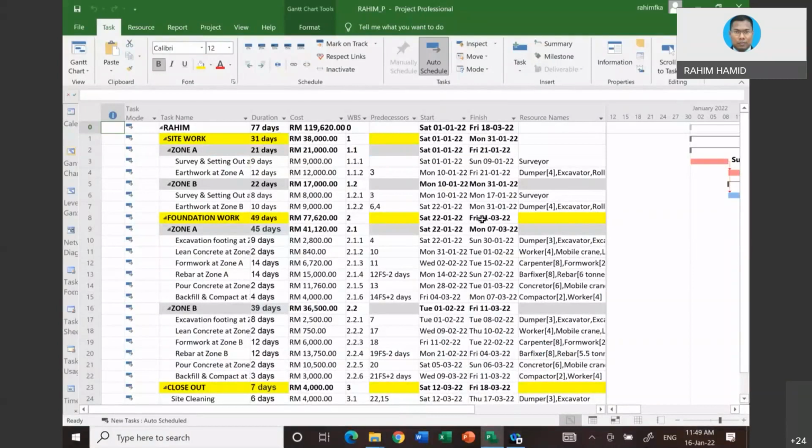Even when you already win a tender, for instance, within a few weeks, you need to submit real work program plus the S-curve. So now we are doing something like that. Okay, how do we do that? Before we go into that, why don't we take another break, like a 5-minute break, to have your coffee.